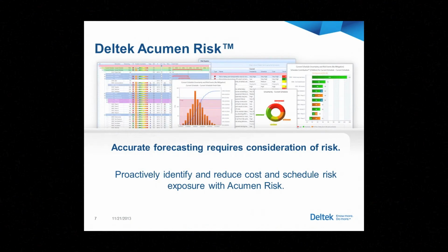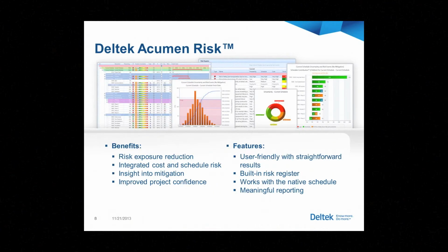Again, the risk piece, allowing you to bring in the risk register or populating the risk register that currently exists in the system. Understanding how the risk through Monte Carlo analysis impacts your schedule, and you can do comparisons to your current schedule as well. So here, it just improves that confidence so you can understand not only how much the risks affect your different activities, but, kind of flipping around, what risks are causing the most delay across the entire portfolio or individual projects as well.